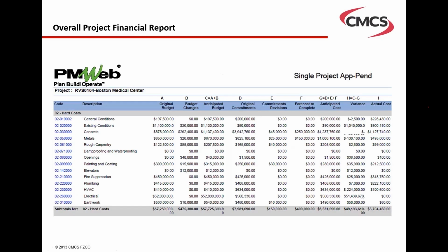Now over here, I have to pause for a second and mention something very important, which is very common again for the construction industry. As you all know, when it comes to calculating the actual cost at the end of each progress period, one of the major nightmares that faces every project owner is: what is your true actual cost? Because your true actual cost is not only the approved progress invoices. This is one part. It also includes all progress invoices that have been submitted but not yet approved, which we call accrual. So again, today we have to create a process called accrual to capture all the progress invoices that, although submitted, are not yet approved. But that's not all.